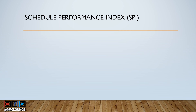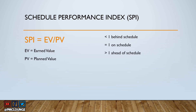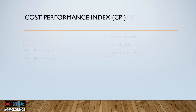Schedule Performance Index, or SPI: SPI equals EV divided by PV, where EV is the Earned Value and PV is the Planned Value. If the answer is less than one, you are behind schedule. If it equals one, you are on schedule. If it is greater than one, you are ahead of schedule — great news.